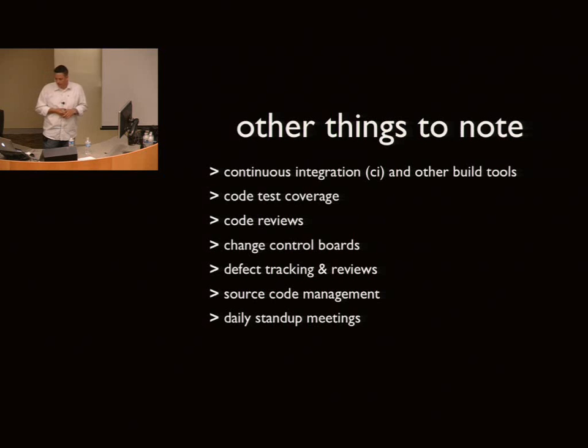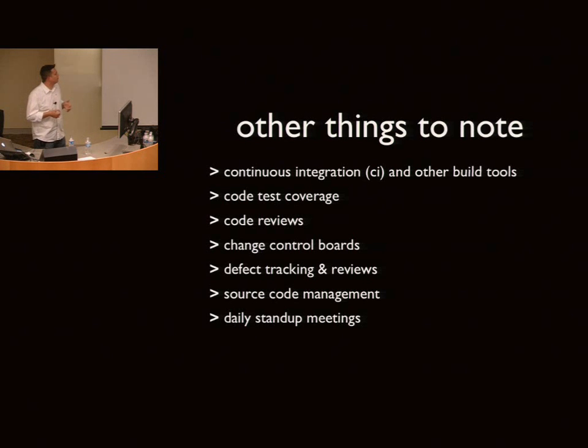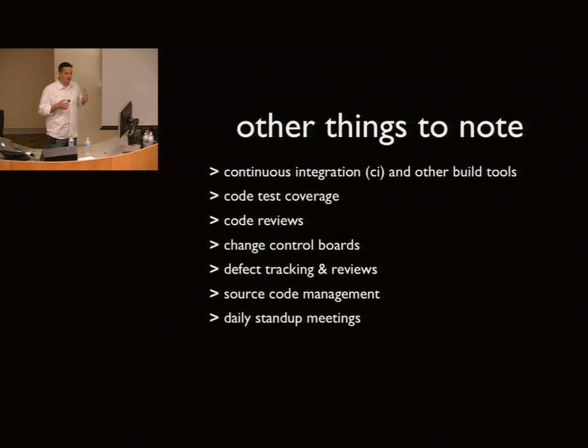It allows you to have the benefits of Git with the benefits of Subversion. The other thing I wanted to talk about were daily stand-up meetings, because these are starting to become not just for development, but any type of project meeting we had. Here's the thing: they can be run really well, and they can be really effective. But most people just try to call every meeting a stand-up meeting. And a stand-up meeting should really take like 10 minutes, right? Everybody should be standing up, go around the room real quick, and table any long conversations for after the meeting. They can easily run 30, 40 minutes where you're just sitting there, and it's more of a daily status meeting.